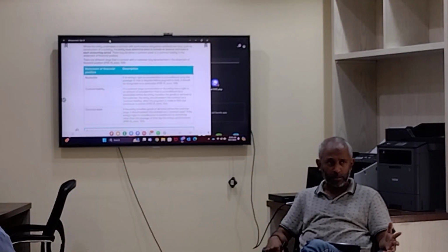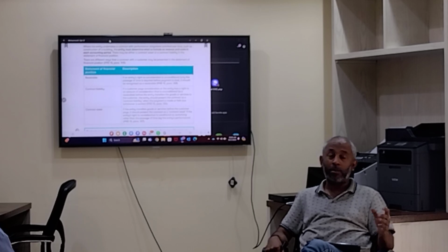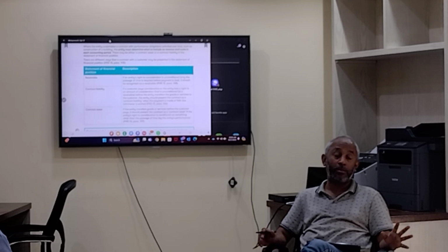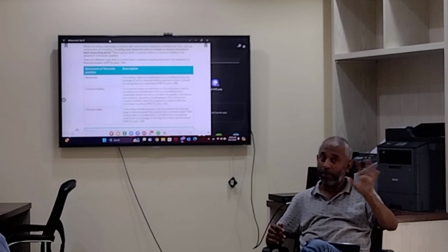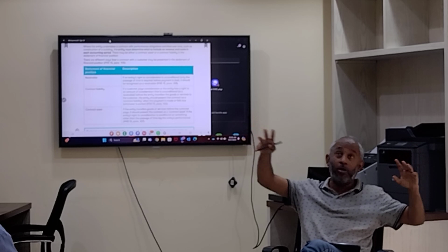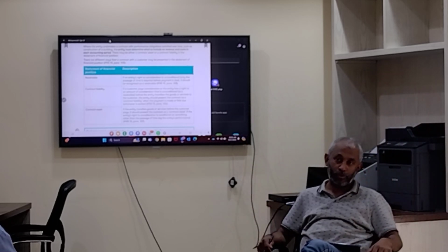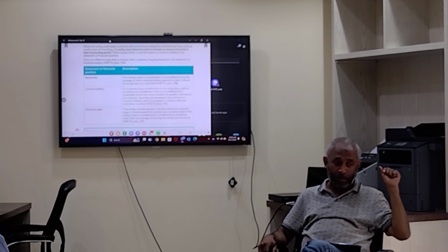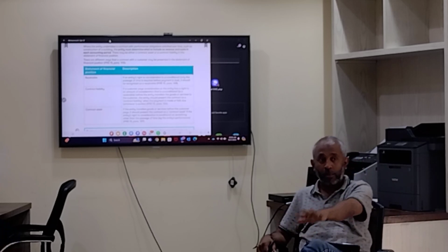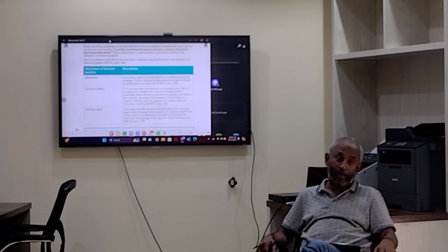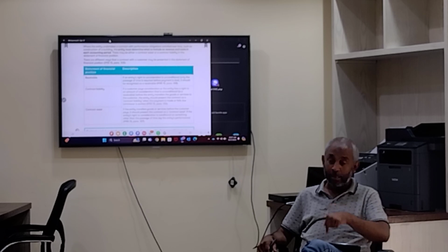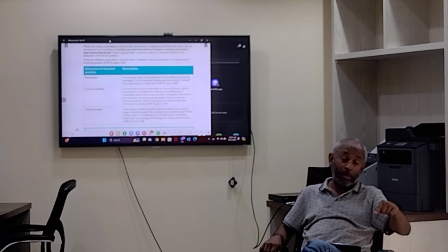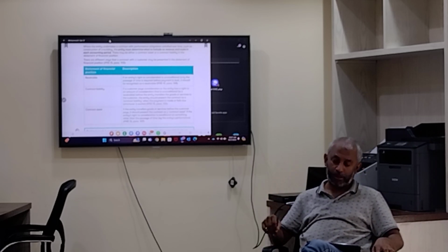All of you know what retention is? Yes or no? No. Retention in a contract. Let's say 5%, 10% like this. In a contract, let's say $100 million, you keep on paying it. At one point, you will withhold 5%, for example, or 10%. You don't pay until another given period. Like one day, they put up a building. After 3 months, if the building collapses, what will you do? So, from the date you get the certificate of completion, you wait for another 3 months, 6 months to have satisfied performance. You don't pay. That we call retention. So retention is a contract asset, and it is conditional not on passage of time, conditional on something other than passage of time.